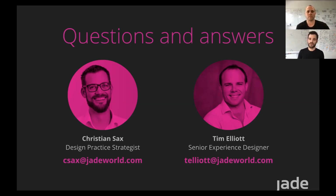If not, then we use external agencies to recruit these people, and we give them a screener with properties that we want, like certain age groups, behavior, etc., and they recruit them for us. They're getting paid for this. People coming in don't do it for free. They usually get an incentive payment between $80 and $100 for this hour.